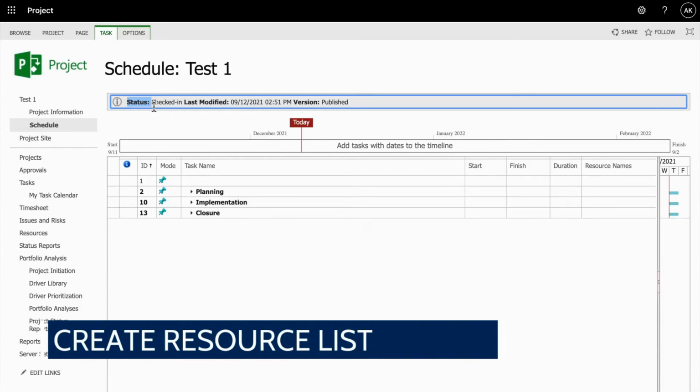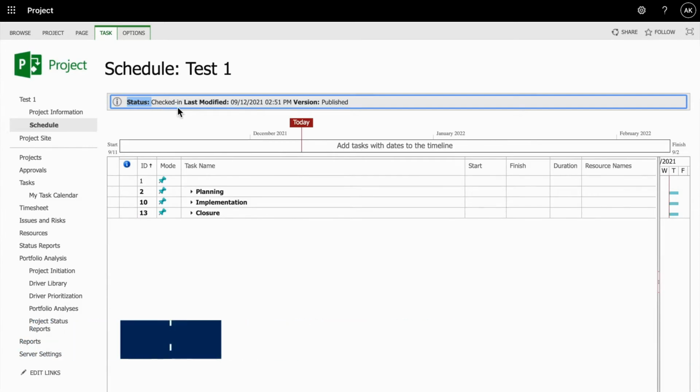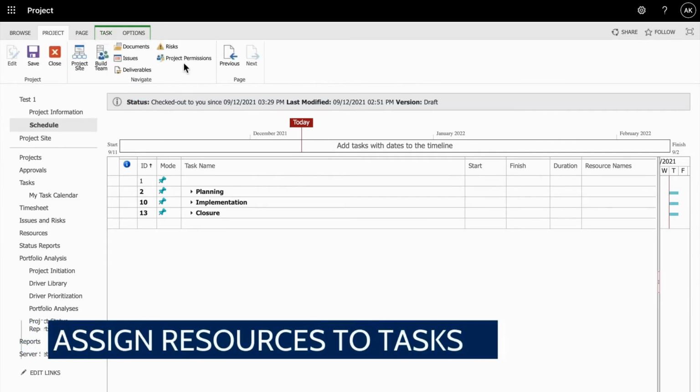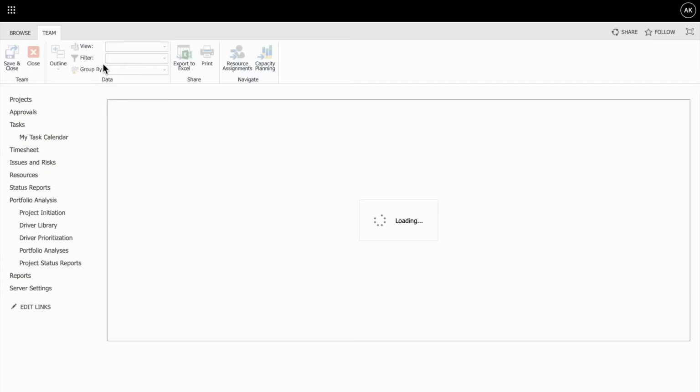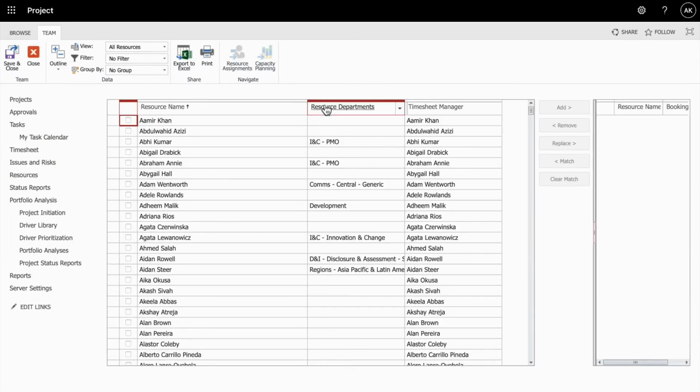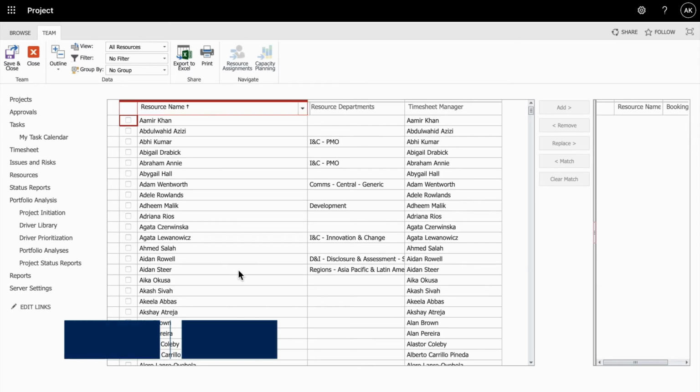Create resource list. Resource sheet. Go to View > Resource Sheet and enter resources along with details like type (work, material), maximum units, and costs. Assign resources to tasks. Assign resources. In the Gantt chart view, click on a task, then go to the Resource tab and use the Assign Resources button to allocate resources. This helps in tracking resource workload and availability.